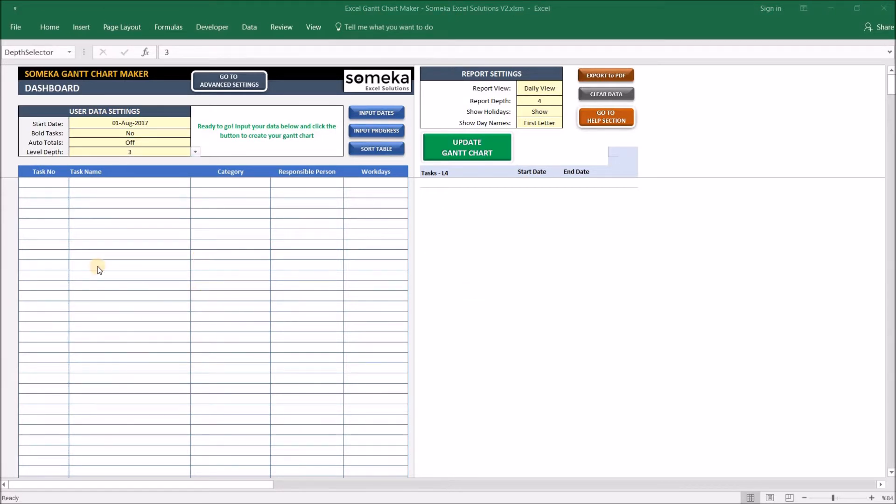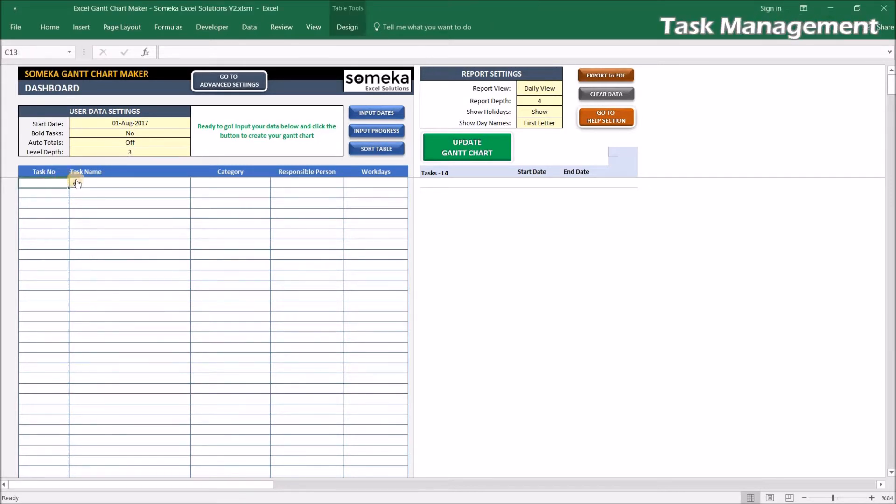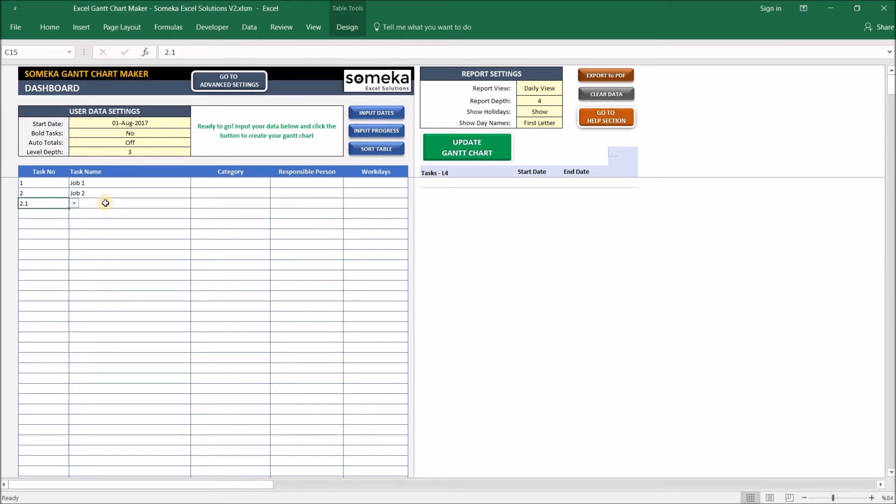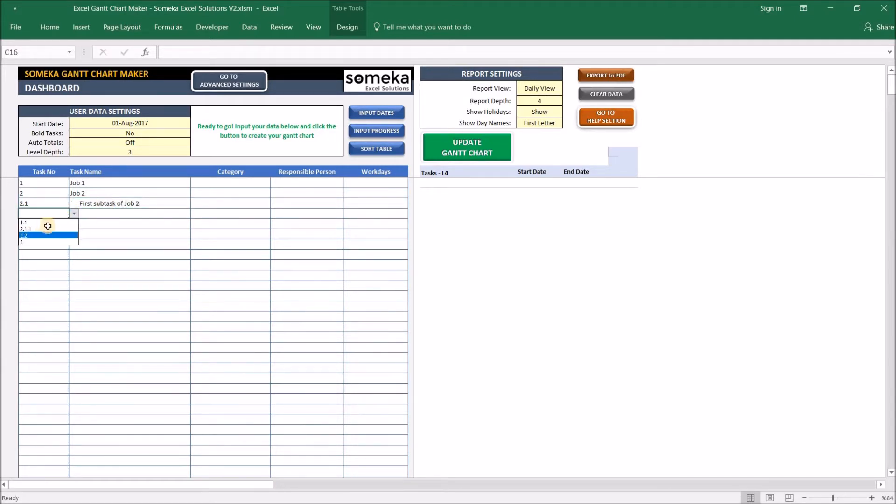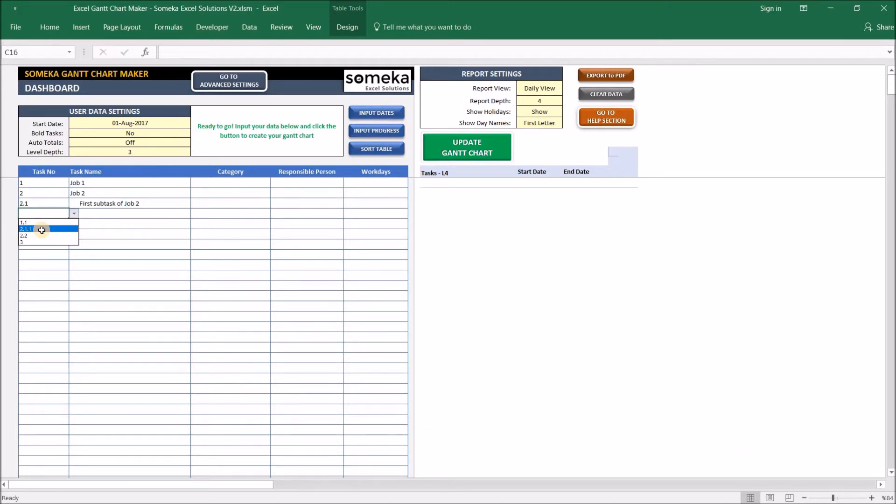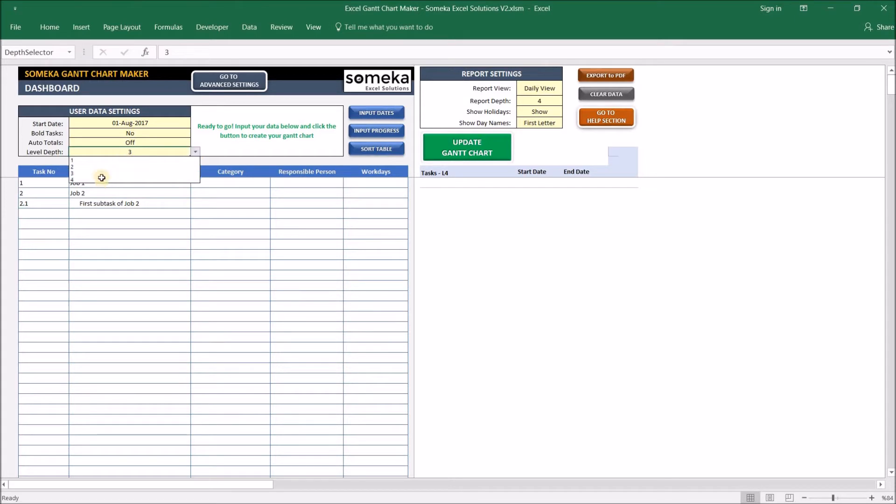Okay, this is our data section for our tasks and duration management. I click on the task number to create some new tasks. Select one and write Job One, and I select two and write Job Two. I'm going to create a new subtask for it, named First Subtask of Job Two. As you see, as I enter new tasks, the tool shows me more options for the new tasks. This is called WBS, Work Breakdown Structure, and if you are into project management, most probably you are familiar with the concept. If you are new, no need to worry—the tool will handle it for you. By the way, this dropdown is defined here, so for example, if you think that you want to go deeper than level two, then you can choose it here.